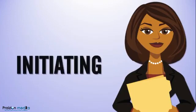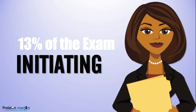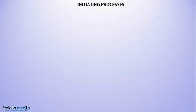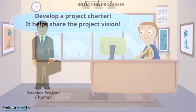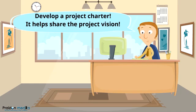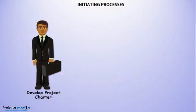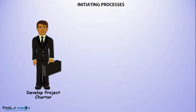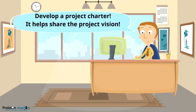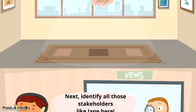The first thing that should happen on any project is the initiating of the project. In the initiating process group, the very first process is Develop Project Charter. This is where the project is authorized. The project charter is an authorization document and is an output of this process. We also begin to document constraints and assumptions at a high level, so the assumption log is also an output of the Develop Project Charter process. Bear in mind that Develop Project Charter could happen at predefined points throughout the project to authorize phases or other segments within the project.